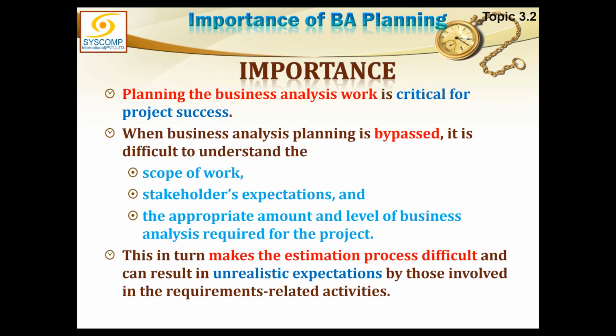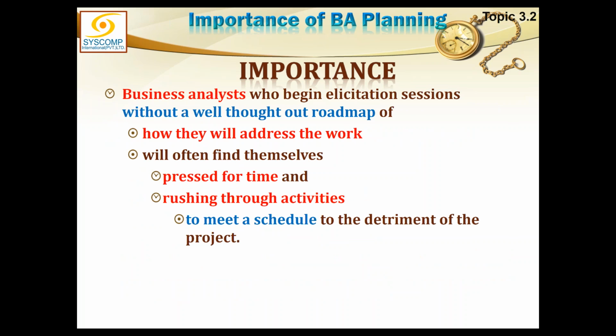This in turn makes the estimation process difficult and can result in unrealistic expectations by those involved in the requirements related activities. So business analysts who begin elicitation sessions without a well thought out roadmap of how they will address the work will often find themselves pressed for time and rushing through activities to meet a schedule to the detriment of the project. What does that mean? Firstly, if we do not do the business analysis planning, it is not good for the project. Although the project can be done, it makes life difficult for the project.